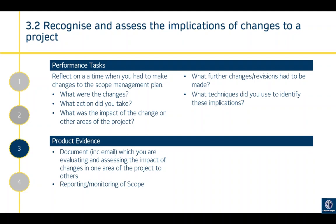There are always knock-on effects from a change request — it's never the case that a change request only impacts one aspect of the project. Reflect on a time when you've had to make changes, what the changes were, and provide analysis of what impact that would have on other areas. Consider what further revisions might have to be made to other aspects of the project management plan. Product evidence would be a document or email evaluating and assessing the impact of changes in one area on others — network diagrams, resource documentation, or communications to colleagues seeking their input are all useful.